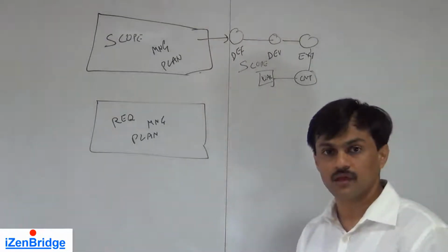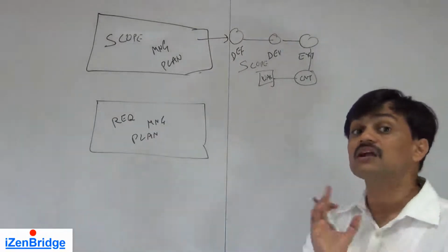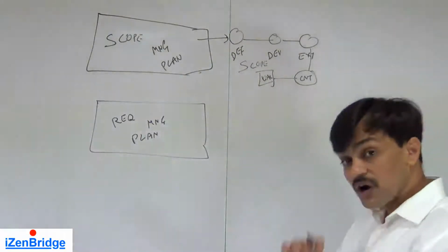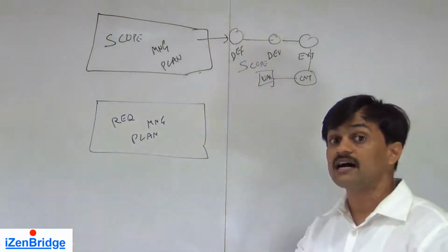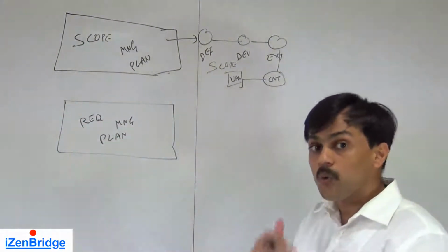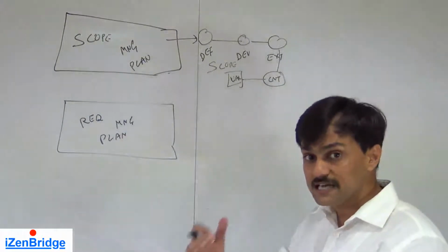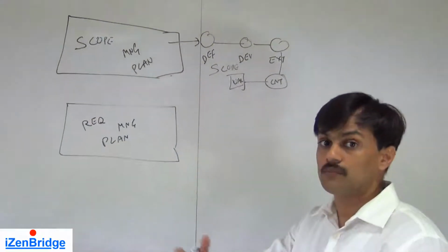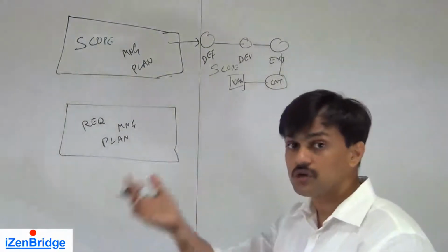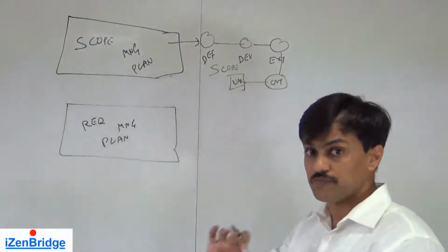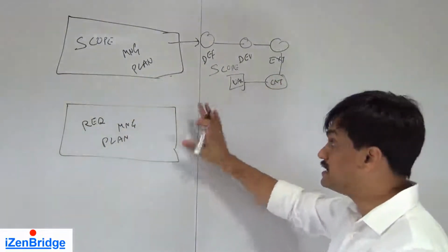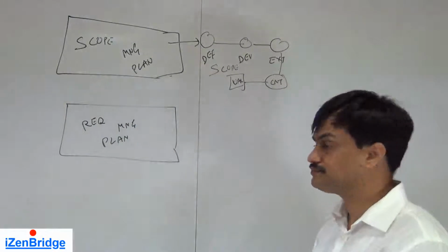What does it mean? It means at what level we should define the work breakdown structure, at what frequency we should take acceptance from the stakeholder, what is the process of taking acceptance or a validation from customers, that is defined. Are we going to follow a demonstration, or are we going to follow some frequent releases? What approach we will follow for this is defined in scope management plan.